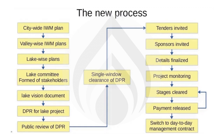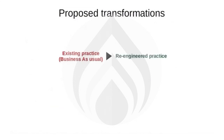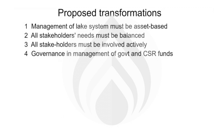All details such as scope of work and sponsorship are finalized. The lake team monitors the progress of the project, which is cleared stage by stage with payment made to the contractor as each stage is cleared. Timely payments are crucial to ensure there is no corruption. Once the project is completed, the team switches to day-to-day management mode. We also need to re-engineer all the processes and procedures. These changes address four goals: asset-based management of the lake system; balancing all stakeholders' needs; actively involving all stakeholders; and governance in management of government and CSR funds.